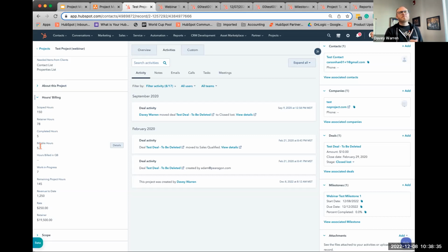That way I can see how much money is still available to be billed directly in my HubSpot, and I can report on that, which is nice for me as a business leader. Instead of going over to QuickBooks to see what I'm billing and see what I'm billing here, or trying to calculate backwards, I can know exactly how much revenue is still open in my system that needs to be billed. And I can even do that against the retainers that have already been paid, and look at maybe cash value that may be coming in if I'm looking at cash flow.